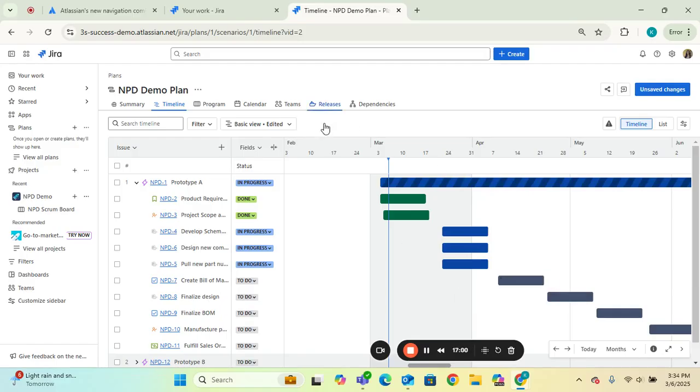I think the biggest call out in the difference here is that you can add and show fields here as well as add filters, and you can do cross project dependency mapping. So if there's another team with another Jira project and you're dependent on them to complete something else, you can do dependency mapping within the plans. Whereas under the timelines, which we access through the Scrum board, you are not able to do cross-project dependency mapping. And so that's something that's very big to consider. But if you have used Jira in the past, timelines, again, has those less features.